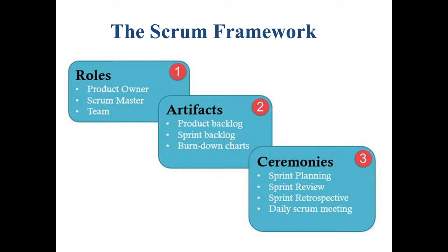There are a couple of ceremonies, and not wedding ones, within the framework. The first one is a sprint planning, which happens at the beginning of every sprint. The second one would be the sprint itself, with the main ceremony being the daily stand-up meeting, which I said you say what you did yesterday, what you are doing today, and any impediments you have. The Scrum Master is responsible for trying to help to solve the impediment that occurred.